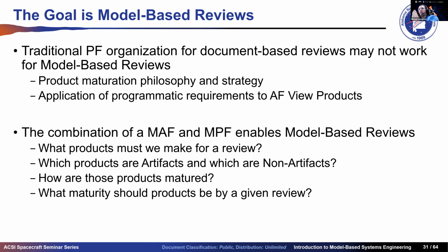So if I have 8 reviews and 100 products, I need each product to be known what it's going to be, artifact or non-artifact, who is producing that product at which review. And if we can do that, it's going to reduce the amount of time it takes to generate those products in a review data package provided to the stakeholders before the review.